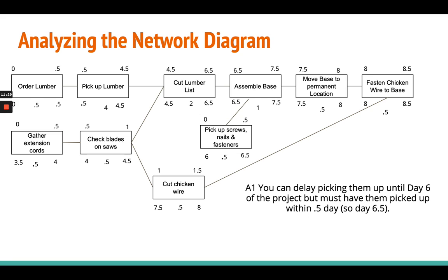And the answer is you can delay picking them up until day 6 of the project. But you must have them picked up within half a day. So day 6.5. So really, you can pick them up on day 1, 2, 3, 4, 5, 6 is the latest because you have to get them done by 6.5.